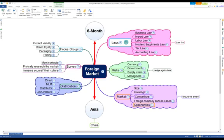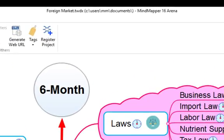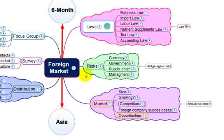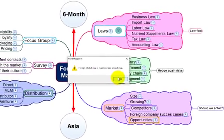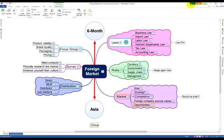Display map schedules in the planner by adding the map as a project map and give it a color so that you can tell which schedule items are associated with the colored project map.